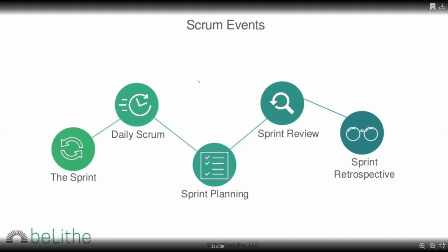So this is in no order, but sprint planning comes after the product manager has done the backlog grooming and then prioritized the work to be done. You plan with the team and assess based on historical data. Typically, the team is able to go through 100 user stories because you have a team of 5. So you have to know, okay, this developer is out sick or on leave or vacation, or on their honeymoon. That means we're short staffed, so we can't really do 100 user stories. So we have to do only 75. So we plan, and we are adaptable for that, right?